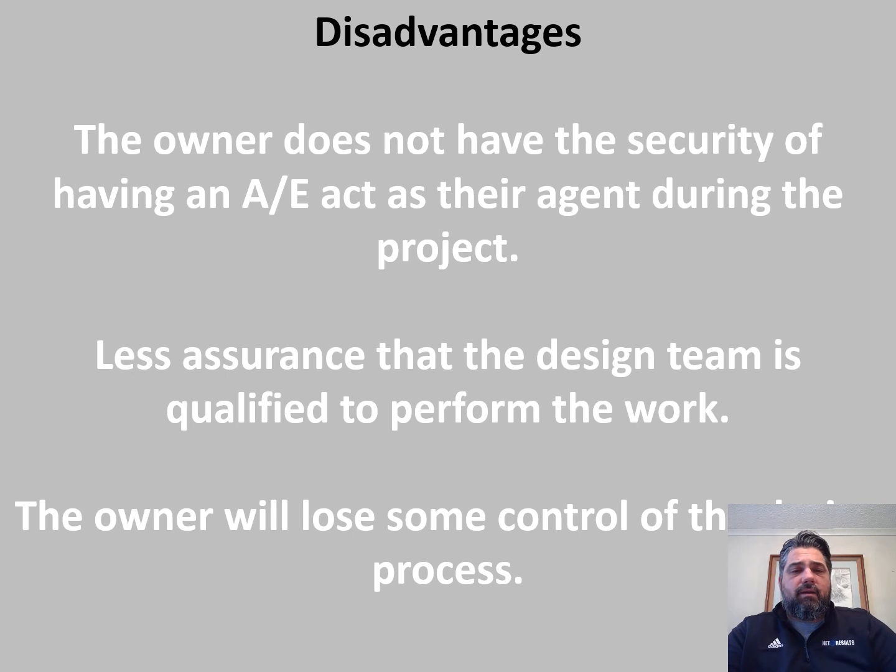Some disadvantages of a design build scenario is the owner does not have the security of an architect engineer to act as their agent during the project. So there's often times where an owner may go out on site and they're like, man, I just don't think this is constructed right. Let me call my architect. Well, they can't do that under this scenario. They're contracted with a contractor typically, and so they're dealing with just the contractor.